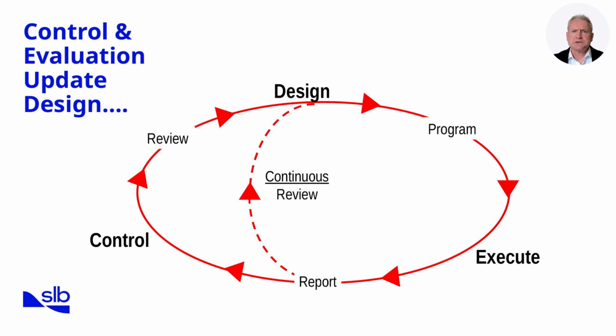plan. The evaluation step is critical as it identifies where assumptions in the original design may have been incorrect or incomplete. By feeding these insights back into the design, the next well benefits from a more refined plan. The diagram shows this loop clearly, with arrows linking design, execute, control, review, and report in a continuous cycle. Interpreting it, you can see how each stage informs the next, preventing knowledge loss between wells. In essence, this process transforms operational experience into design improvements, which is the heart of drilling optimization.